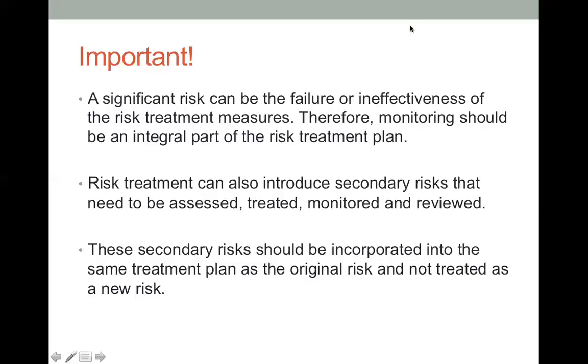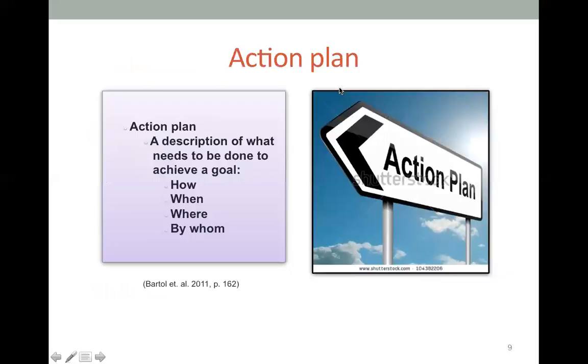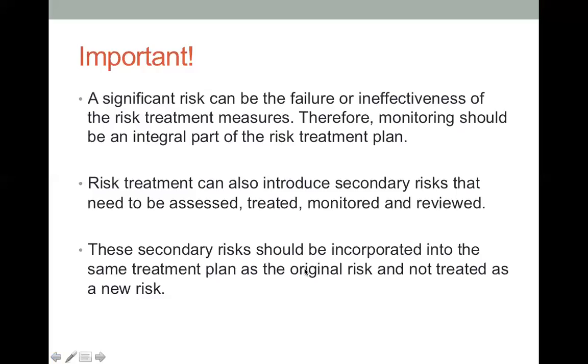And it can also introduce secondary risks. What it means is that the risk that we are treating may develop into a different risk. Therefore, we need to assess that again and treat the secondary risks, monitor and review.